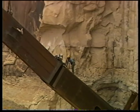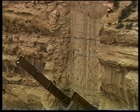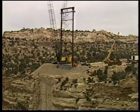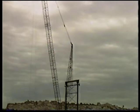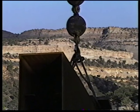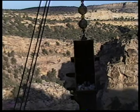top of the tower. The crane line was then cut loose, and the backstay line on the rib side of the tower was tightened to re-plumb the tower. When the next rib was set, the tension in the previously set rib was adjusted as necessary. This unlimited adjustability in both the forestay and backstay lines made it possible to precisely control the vertical angle of the arches. For operating when the crane was configured as a guy horse, the number 5 through number 8 ribs